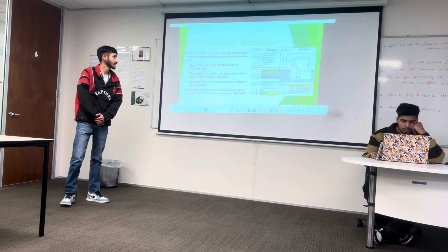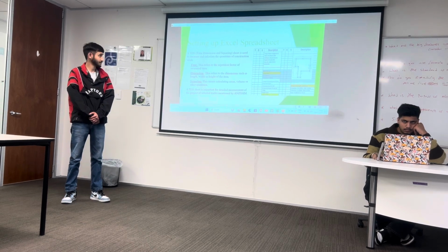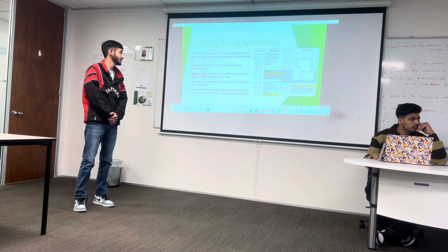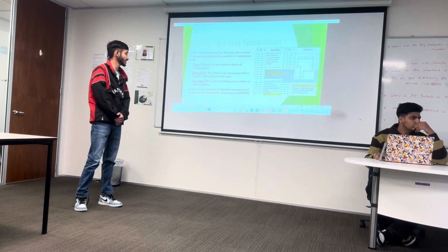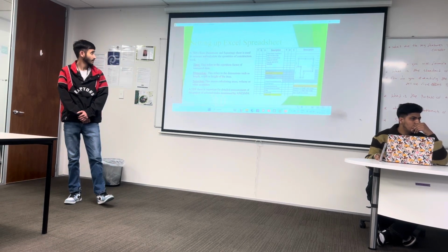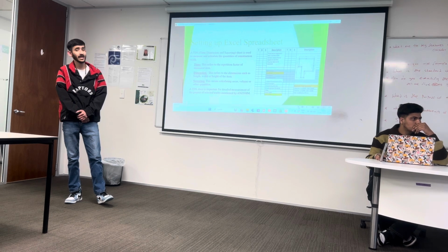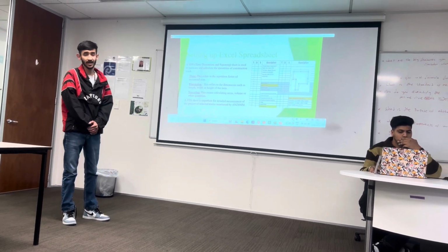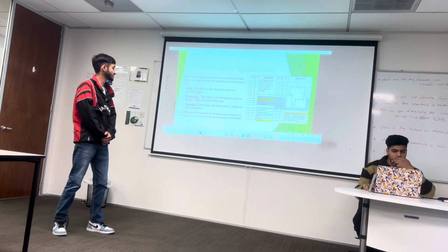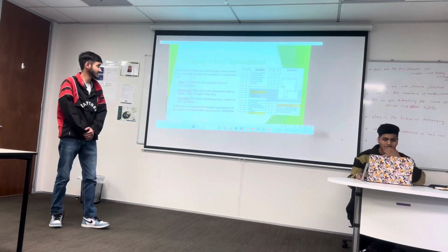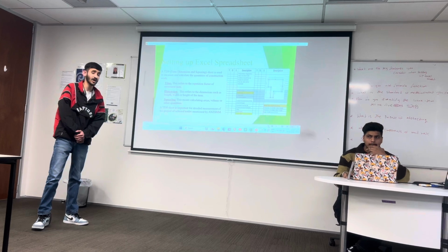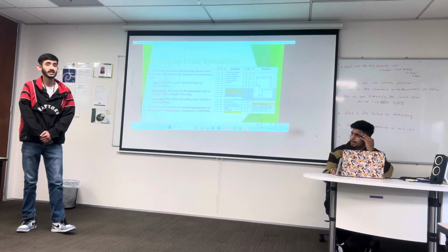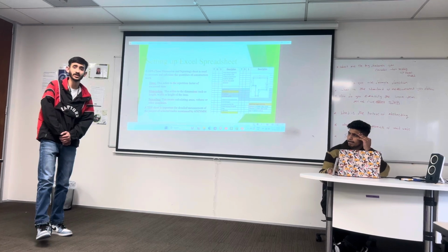Next, we have setting up the Excel spreadsheet. A TDS sheet, which is a time, dimension and squaring sheet, is used to measure and calculate the quantities of construction work. Time refers to the repetition of work or factors of any item. Dimension refers to the length, width or height of the item. And squaring means calculating areas, volume or other quantities.